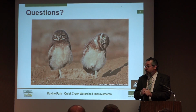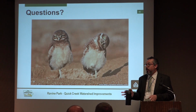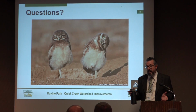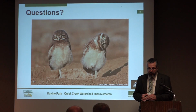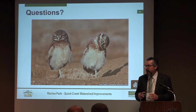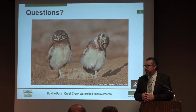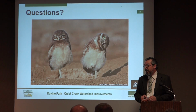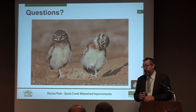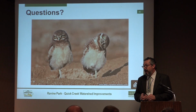It has been done before. Woodbury County Conservation has burned some of their own properties within city limits. They have a permitting process where you work with the fire marshal to establish that. Scott Motes with the Nature Conservancy, another one of our project partners, has worked with the city. He's a burn plan reviewer, and so it's a serious process. You've got to have a solid burn plan. You've got to submit it to them in advance for review. They've got to approve it.